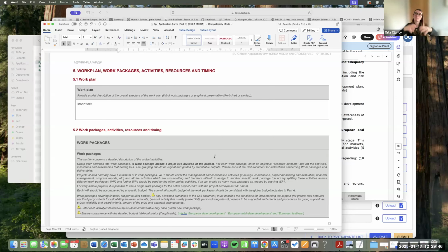So it's a further expansion of the strategies that you have. You do your strategies, the big thinking, and then you pick out the individual tasks and put them in here. They have to relate back, and the relevant cost related to those tasks and deliverables needs to be matched in the budget.